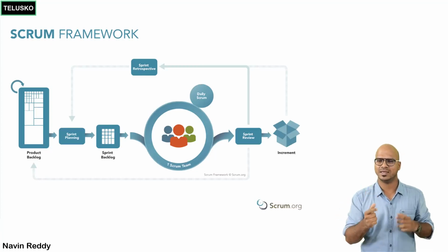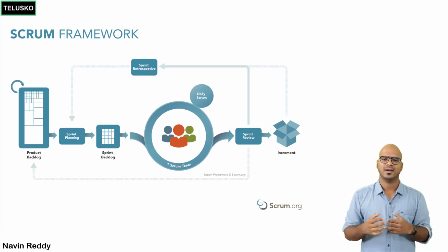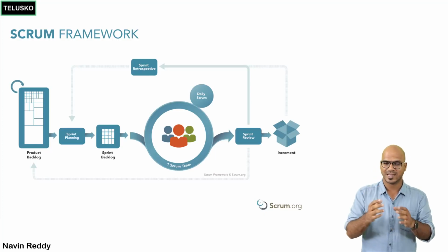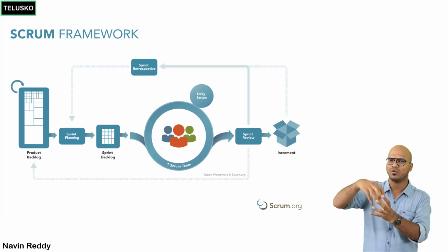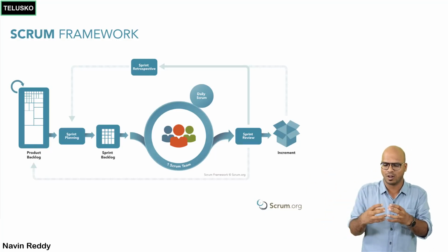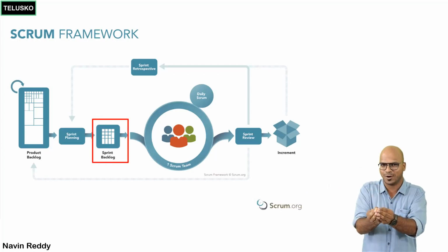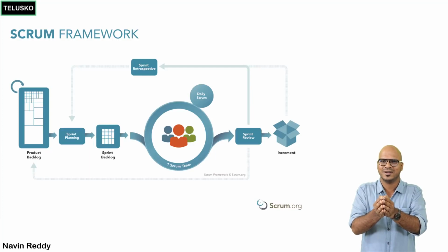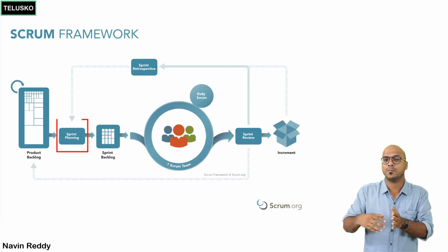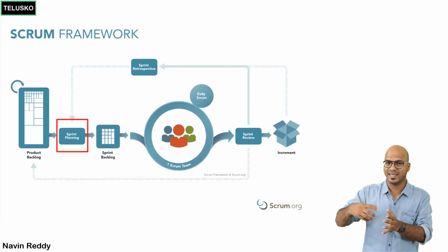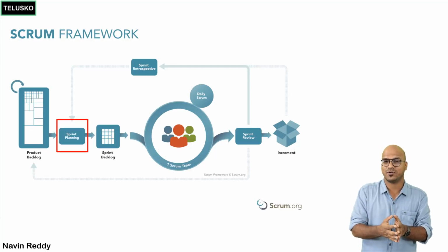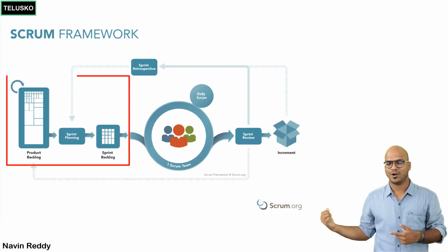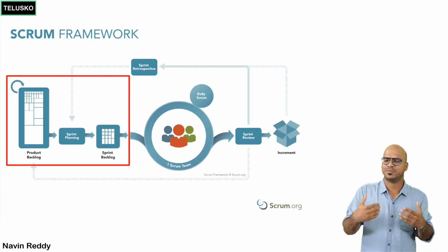So one sprint is 1 week or 2 weeks or 4 weeks. So let's say if you define 2 weeks, that's your first sprint, you will take some requirements from the backlog, right? And you will call it the current sprint backlog. So for 2 weeks, right? Now, of course, it will have a smaller number of requirements. But before that, you have to also plan your sprint, right? What you will take, and what are the requirements we have for this. So basically we got a product backlog, then you have to plan, and then you will get a sprint backlog.